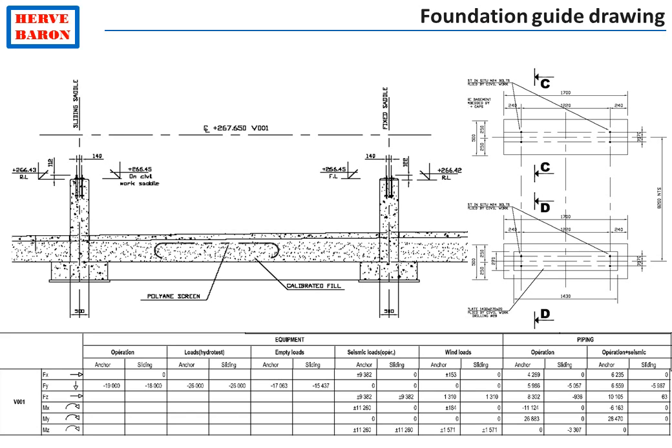The civil engineer of the EPC contractor does not always perform the design of foundations. Indeed, the design of foundation has to be by law compliant with the local code where the plant is being installed. And the EPC contractor civil engineer is not always familiar with this code. Therefore, it often employs a local engineering office to perform the design of foundations.